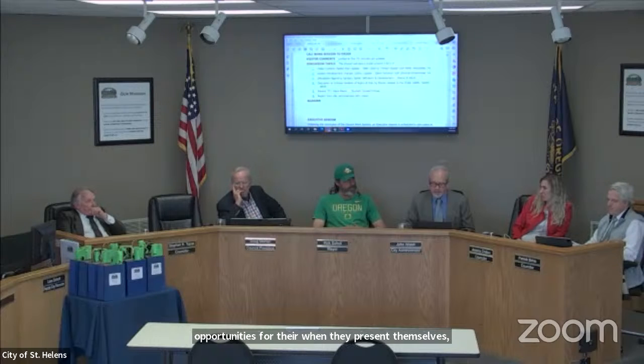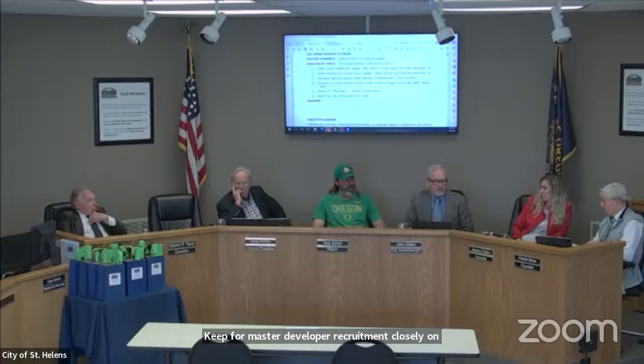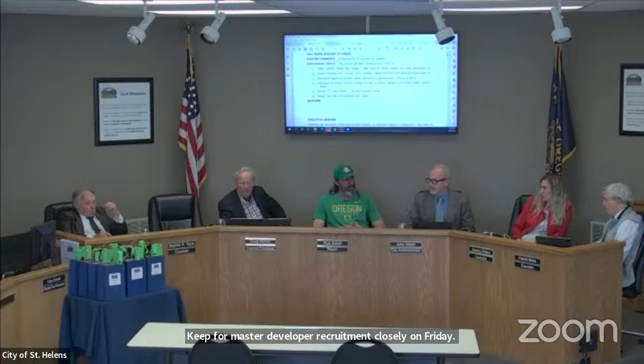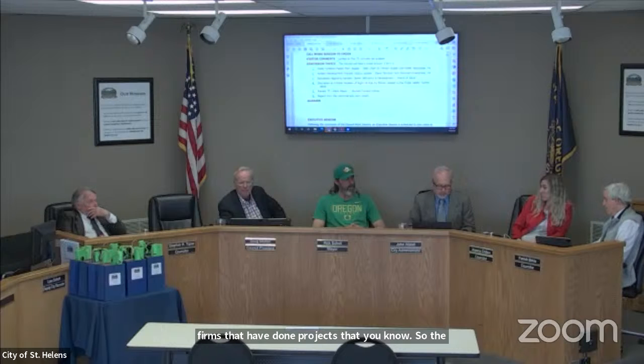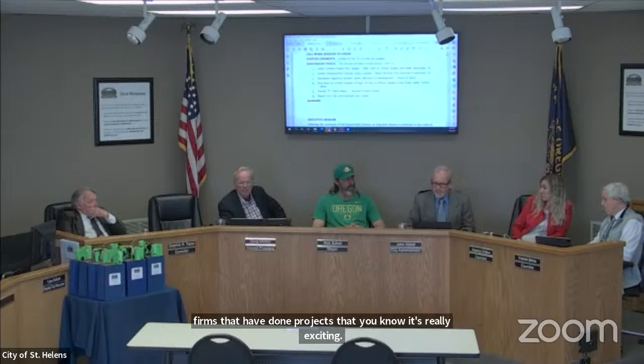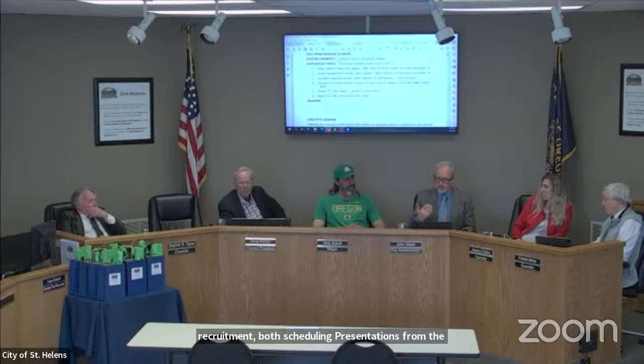Exciting news with the RFQ for master developer recruitment, which closed on Friday. We got 2 proposals back, both from really well qualified firms that have done projects that you know. It's really exciting. So we're trying to come up with next steps: scheduling presentations from the developers to come in and talk to us, and forming an evaluation committee representative of the people you want as part of that decision.